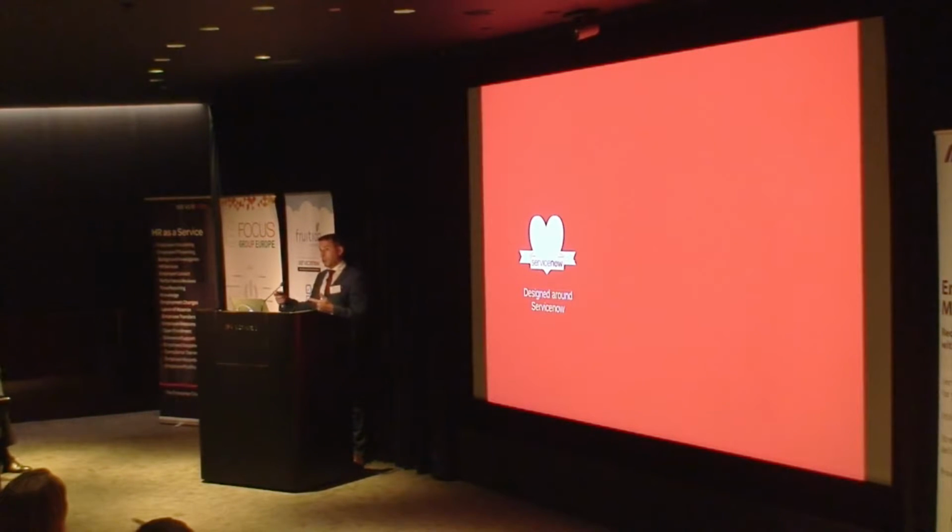We restructured the tender process, and we selected a company called Getronics, who themselves were an early adopter of ServiceNow. We also worked with Focused as one of the suppliers and built our own in-house team of developers who could help develop ServiceNow. And the results were pretty astounding. We managed to turn from running this tender process, covering it, transitioning out to suppliers within 3 months, with 110 business critical applications that keeps planes moving, to then flipping it to Getronics, and then recruiting 23 new roles and introducing ServiceNow for the first time in Gatwick's history.